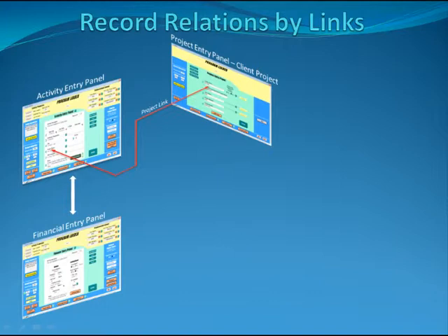The advantage to the user is that the project manager, number, program manager, and client need to be entered but once, while being available to all related activity records. It also allows a report for a client or program manager to exist because the link provides the software mechanism to find all activities associated to them.